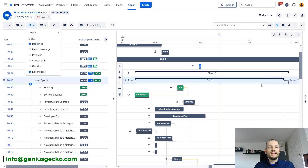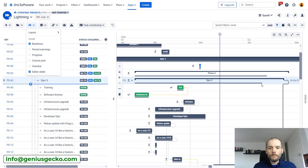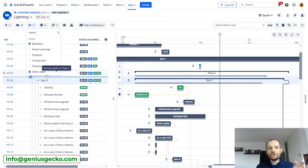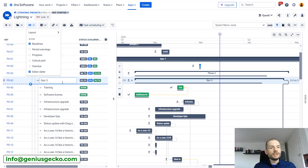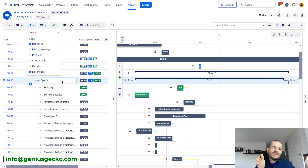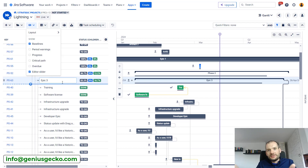The problem with baselines up until now was that there could be only one baseline per Big Picture box or plan. The baseline information was stored in custom fields on Jira tasks, and there were only two custom fields for that — baseline start date and baseline end date. So if you wanted multiple baselines, Big Picture couldn't handle it. This was an issue when a plan evolves: new change requests appear, get approved, the plan changes, and the baseline should change too.